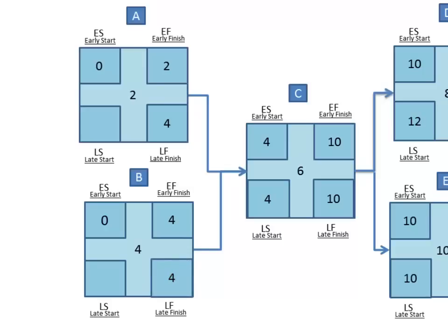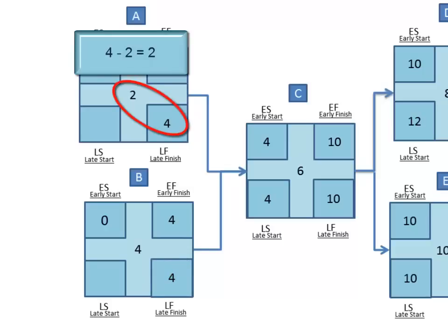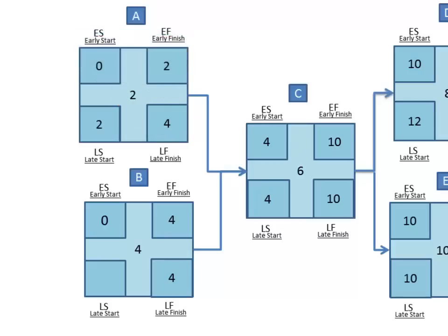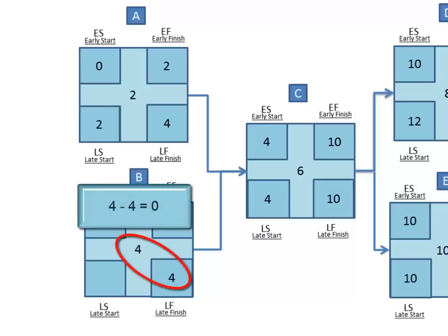Now, subtract the duration of task A from the late finish, and the same for task B, which is four minus four, or zero.